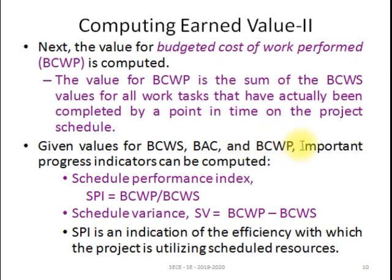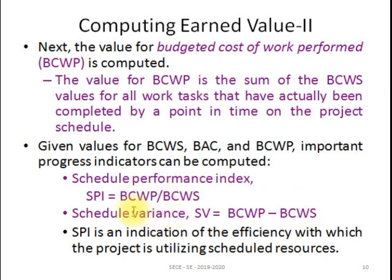Given the values of BCWS, BAC, and BCWP, we calculate the Schedule Performance Index (SPI). SPI is the ratio of BCWP divided by BCWS — the ratio of budgeted work performed to budgeted work scheduled. This ratio gives the Schedule Performance Index. We also find the Schedule Variance (SV), which is the difference between work performed (BCWP) and work scheduled (BCWS). This difference gives the schedule variance.